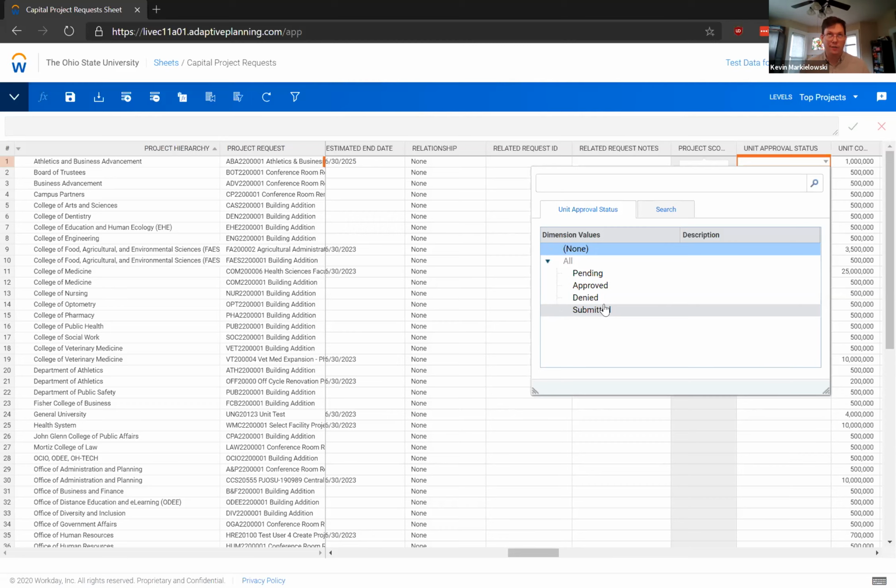This is important. This is the other main field that we will look at when the capital core team is reviewing projects. We will only look at projects which have been marked by the unit as approved. So you can enter in all of your projects going off into years into the future. But if you want a project to be included in the capital plan, it not only needs to be indicated that you want it to start in the current capital plan year, it needs to be approved by the unit. As you're working towards that cutoff date, usually around the Thanksgiving timeframe, make sure that the projects you want to start are approved by your unit, so that as we are working through, we know what we need to be looking at.